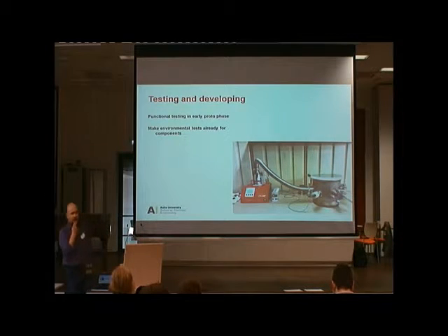Testing and developing. Especially in a CubeSat project, I think it's very useful to start testing as fast as possible, even if you have only the first breadboards or even first components. Normally what you're using are commercial off-the-shelf components, normal components for ordinary electronics, and there is not necessarily space flight heritage for these components. So it would be a good idea to thermocycle, bake out, and do a couple of vacuum tests on these components and see if they withstand this environment.